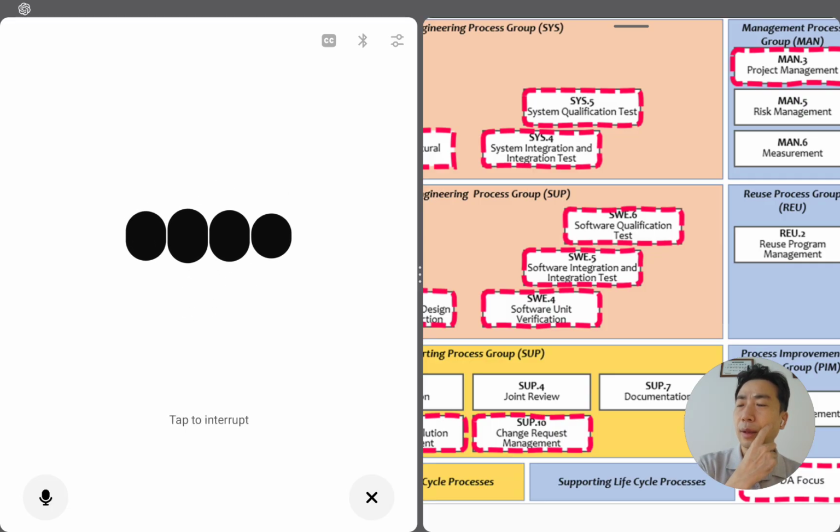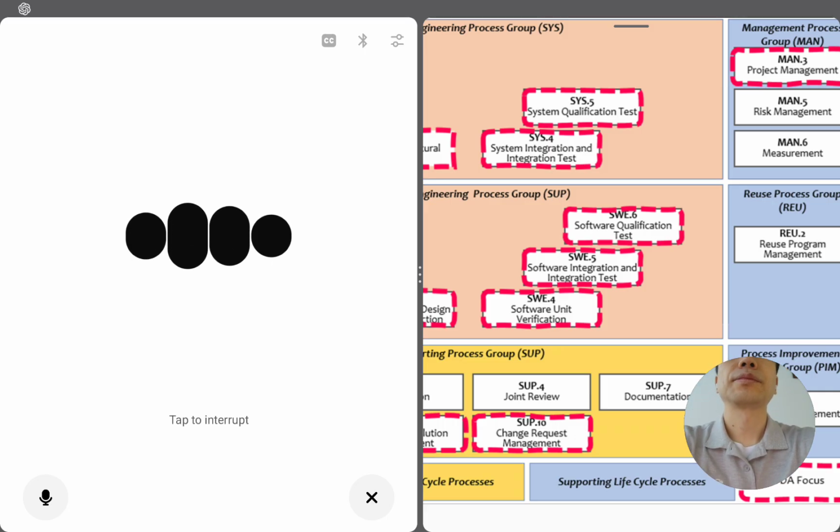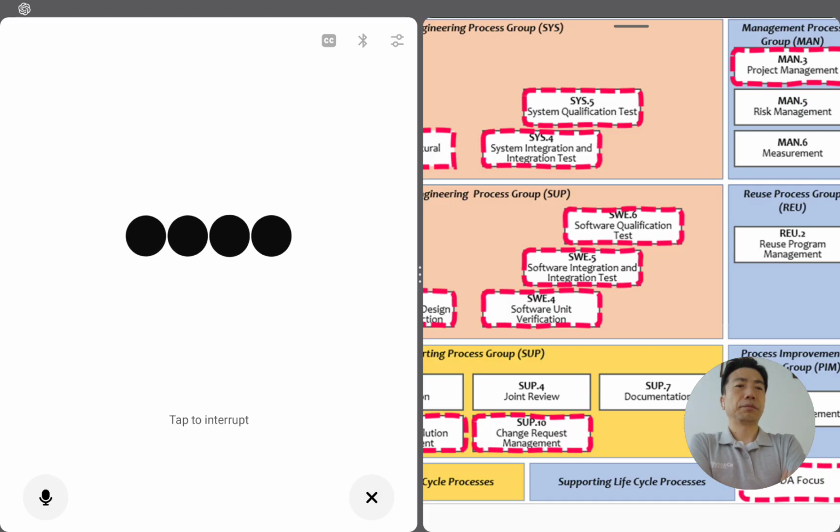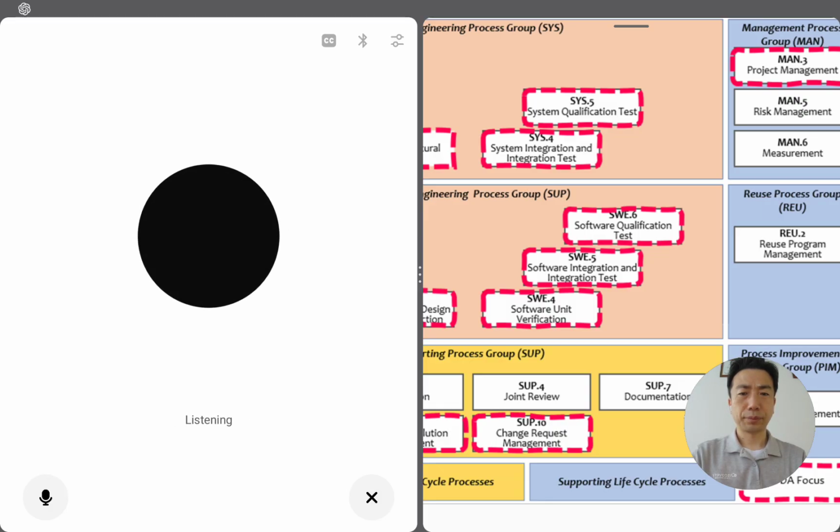Yeah, that's real life. Everyone's schedule collides. In many companies, that's the hardest part of SUP 10. People are busy, so CCB reviews get delayed or done over chat or email instead of a full meeting. The key is not the meeting itself, but the decision record. As long as you can prove the change was reviewed and approved, who, when, and what was decided, that still counts as proper control. How do you usually handle those CCB approvals at MCNext? Formal meeting minutes or just written approvals through the system?